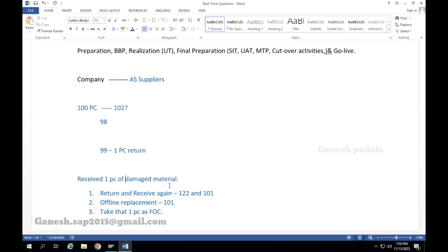So for example, within one project, if there are two or three consultants, how would the work be divided among them? Example, one is on site at the client place, and another two people are offshore. The work will be different. He will be more focused on meetings, discussing with the process owners, understanding business requirements, and he will give to those two offshore people: you will work on the purchasing scenarios, you will work on the inventory scenarios, you prepare the process flows. He will guide them, draw, and send photos of the board, whatever he has written. So he will discuss like that. They can segregate.